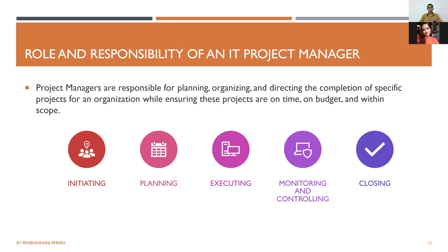So it's a key activity, and there are certain other activities happening, like the official handover of your project. If it's an IT project and you're directly dealing with your users, you might get user sign-offs, handoff of legal documents, payments, right? So there are many key activities happening during the closing of the project.